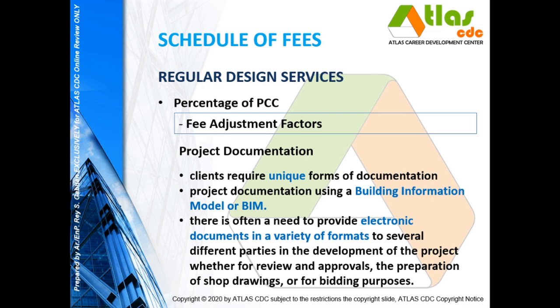Like the project documentation will be using a building information model or BIM, so that will be more expensive on the part of the architect, because it means the architect will have to employ staff that are knowledgeable about BIM, and I think the fee for the staff with BIM knowledge is higher than those with just regular AutoCAD knowledge. No?